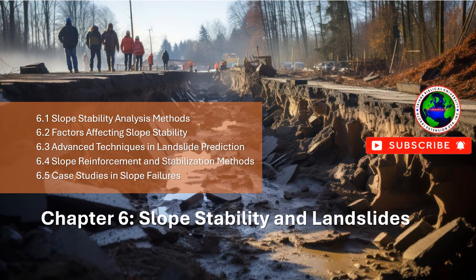Contributing factors. Drilling activities. The drilling for natural gas led to the unexpected release of pressurized mud and gas from underground, which caused the eruption of mud onto the surface. Geological conditions.